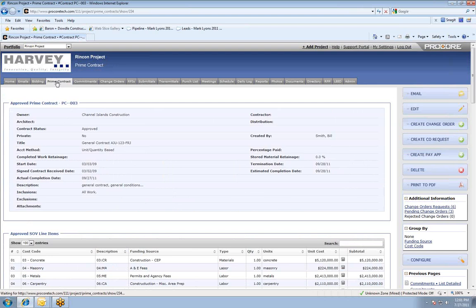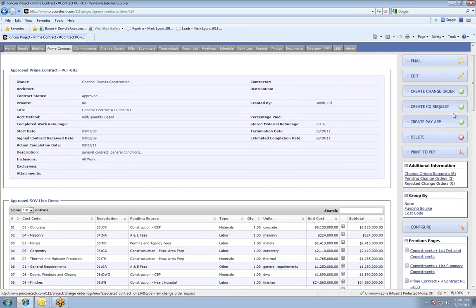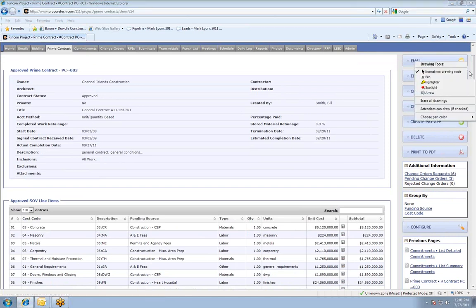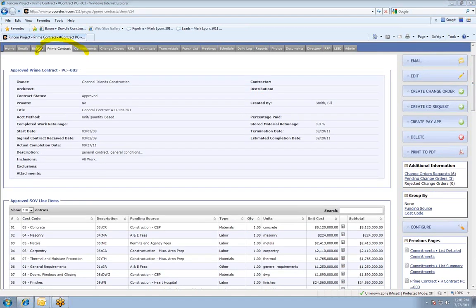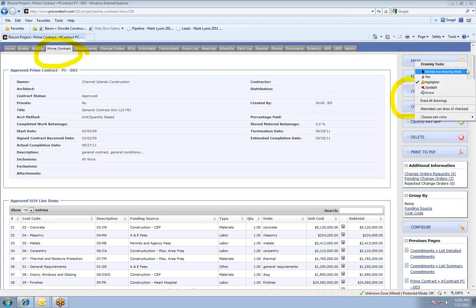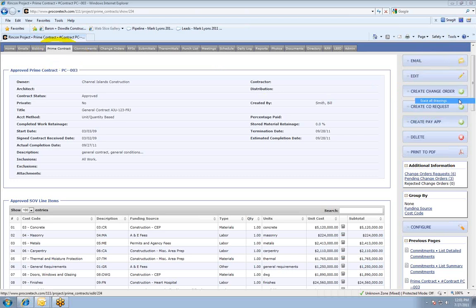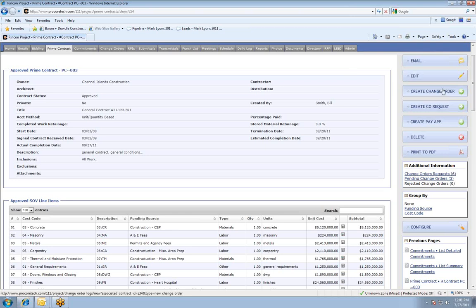There are basically three types of change orders that can be created in Procore. You want to originate the change order in the contract that it's going to affect. So if I'm going to create a prime contract change order, I'll come into the prime contract module. Over on the right-hand side, I have two options: I can create a change order request, which is basically a preliminary change order, or I could go straight into creating an actual change order. The change order request is a preliminary process to communicate information back and forth before that document turns into a change order.